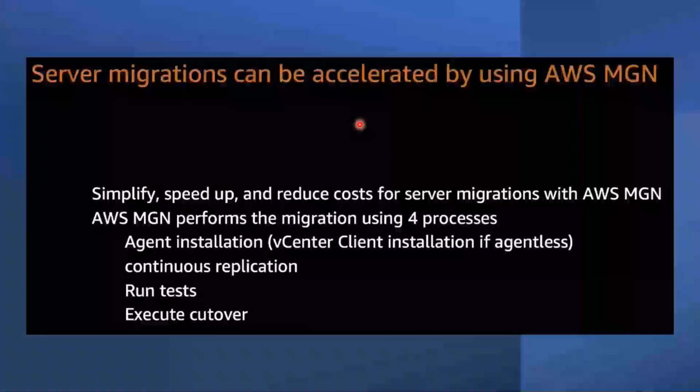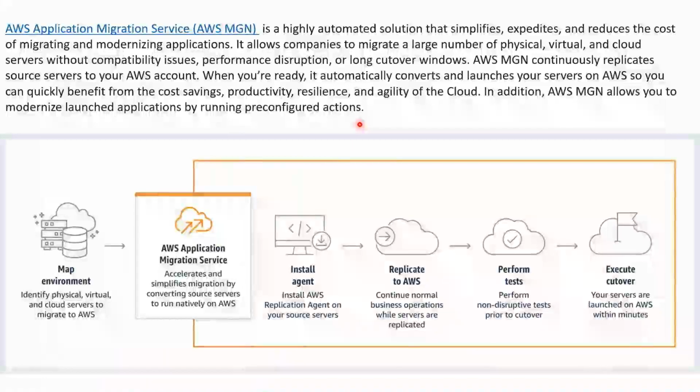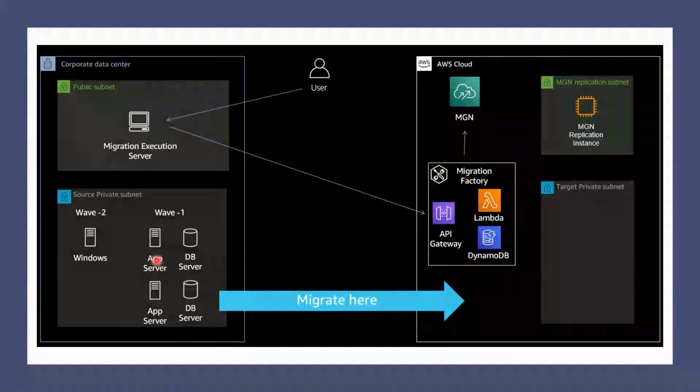We have a few systems running in my on-premises data center. I've got 5 servers, but we'll focus on the first 4. We are going to migrate these systems in waves. In organizations, the program manager or project manager will migrate the systems in different waves, because we might not have enough people or time to do mass migrations. So what I've planned is to migrate systems wave by wave.